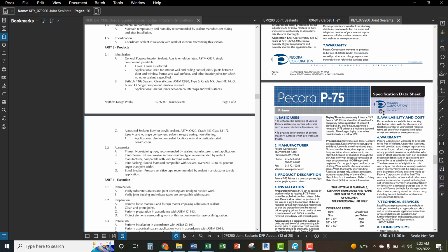It's really important to understand too that in pre-construction, before you get into actual submittals, you should have a very specific way of doing things with your architect and engineer, so they understand that when you submit something, you're going to use some color to mark it up. You're going to use highlights for this and notes for that, just so they understand who's doing what.